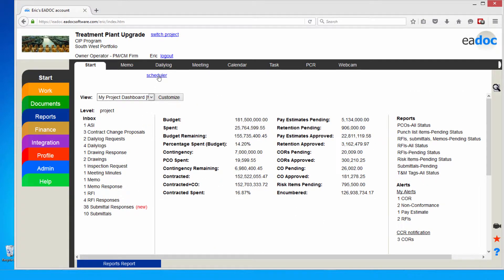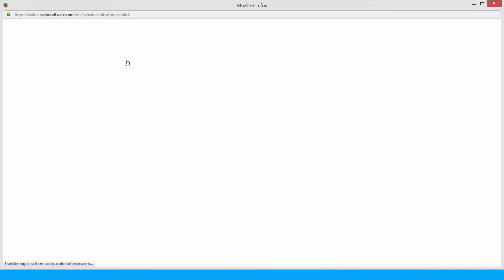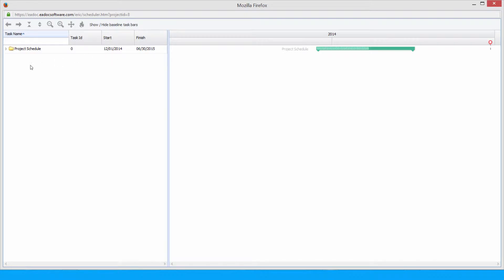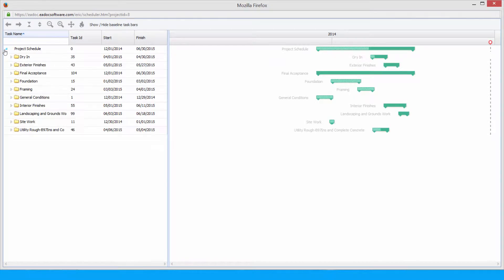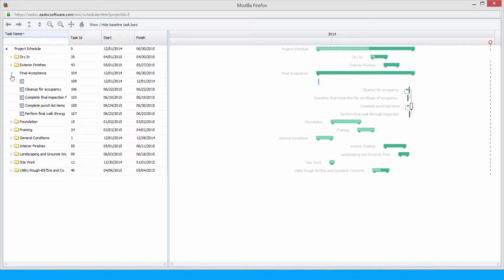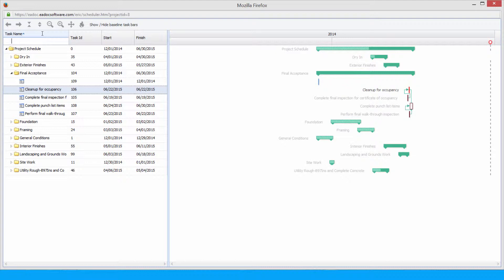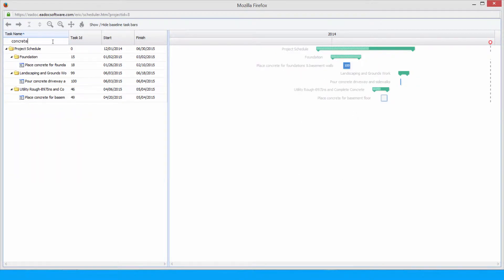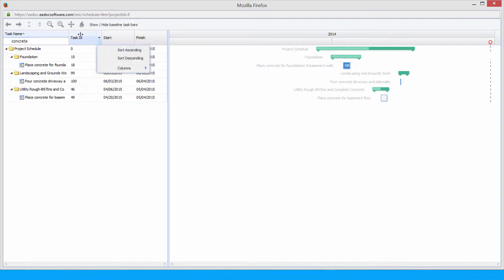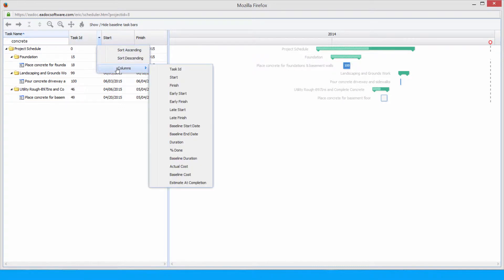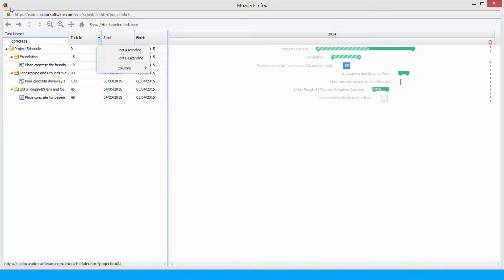The other tool that you'll find here on my dashboard is the scheduler. If I want to bring up, say, a Gantt chart of the project, I can launch that off my dashboard. What we're doing here is we're consuming either MS project or P6 schedules. You can import your schedule into the application. This becomes a very easy to use tool for navigating around that project schedule. I can search by activities. Say, for example, I'm a concrete inspector. All I care about is the concrete activities on the project. I can search for every activity with the word concrete in it. I can also show and hide the baseline and critical path here as well. I can configure my column layouts. What information do I want presented? It's very easy for the users to configure the presentation and how they want to consume the information here in the system.